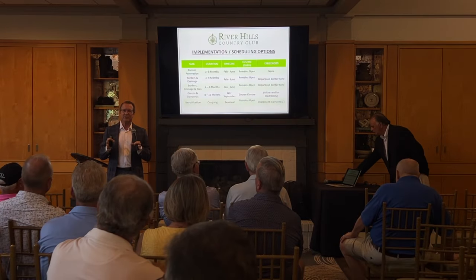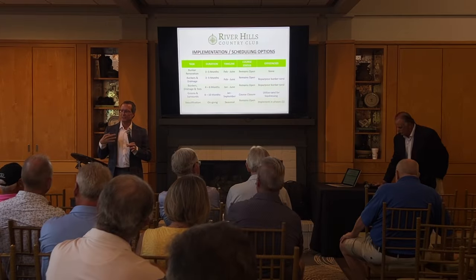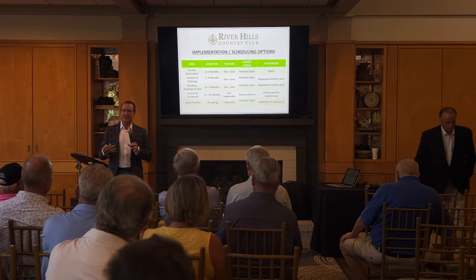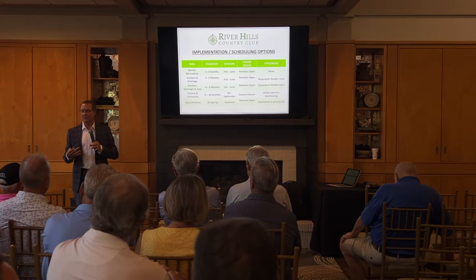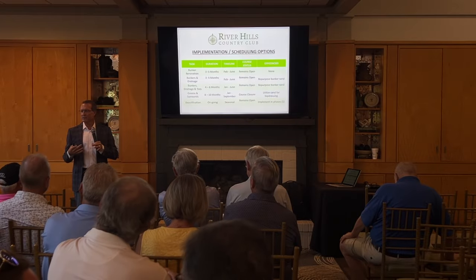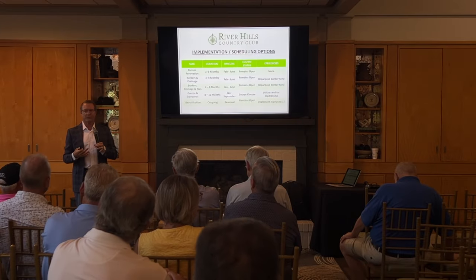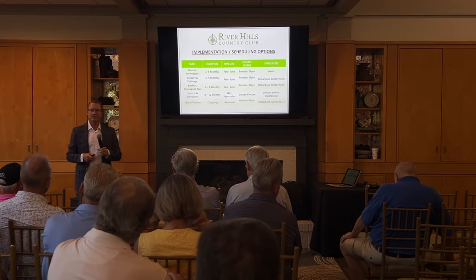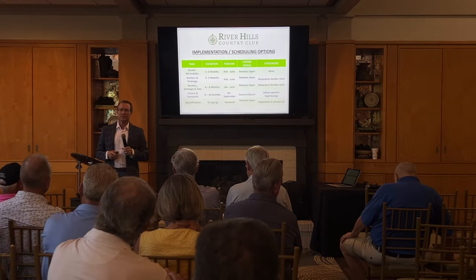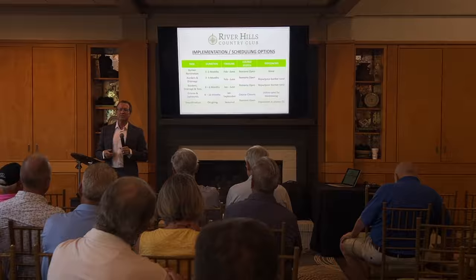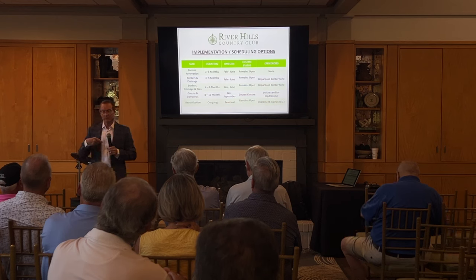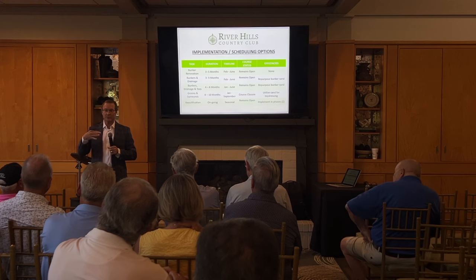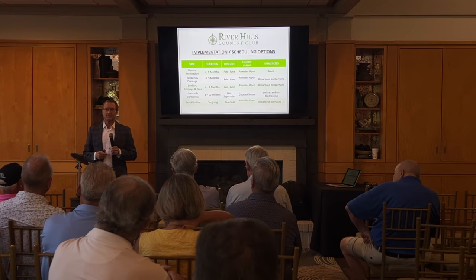It's a technical renovation to get the subsurface, the drainage, the material up to quality standards so that you can confidently grow consistently healthy turf. So you're drilling down with what, 4-inch holes and rebuilding that green? No, you're digging a tub. A mini excavator digs down 16 inches and you bring it back up with gravel. It would be new drainage, 4 inches of gravel, 12 inches of mix.